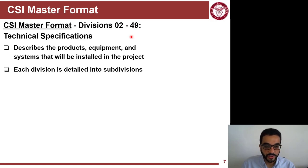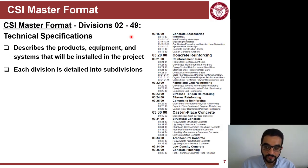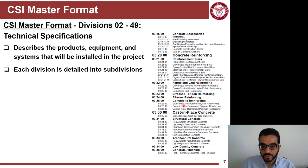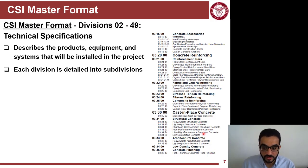The technical divisions from 2 to 49 describe the products and equipment that need to be installed in different divisions of work. Every division is detailed into subdivisions. For example, here I'm showing part of the CSI Master Format for Division 03. You can see the outline is detailed into sub-outlines: 0315 is concrete accessories like water stops and joints; 0320 is reinforcement — bars, fabric, fibrous composite reinforcement; and 0330 is cast-in-place concrete, further defined by type: structural, architectural, or low-density concrete. You can specify and detail the unique parts of every work division.